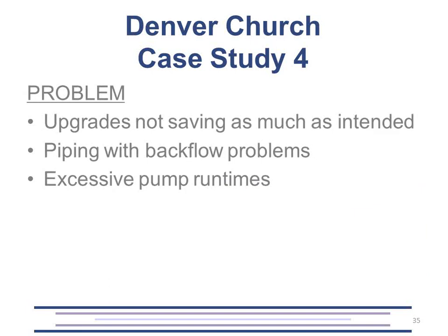Close to the end of the project, the energy engineer was brought in to verify operation. None of the systems were installed quite right. They did provide heating and cooling, but would not achieve the savings originally projected. And the systems were having many problems as well, and the building operators didn't know what to do with it. In fact, at one point, they asked if we could remove the computer system and reinstall the non-programmable thermostats. No one was happy.